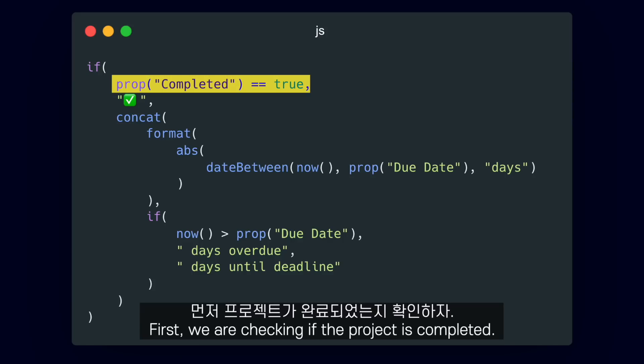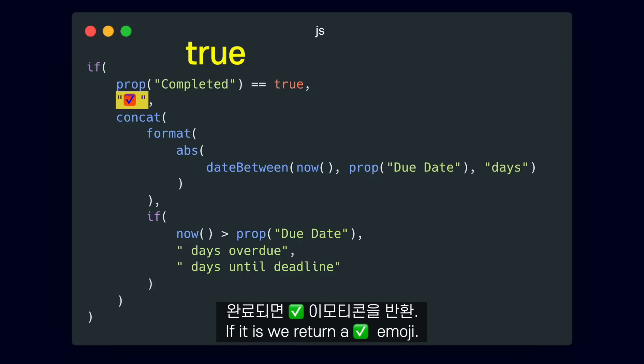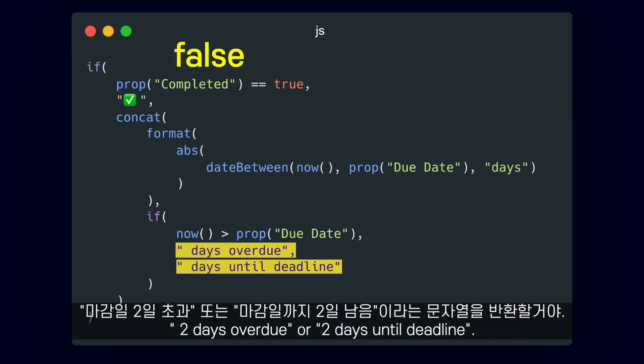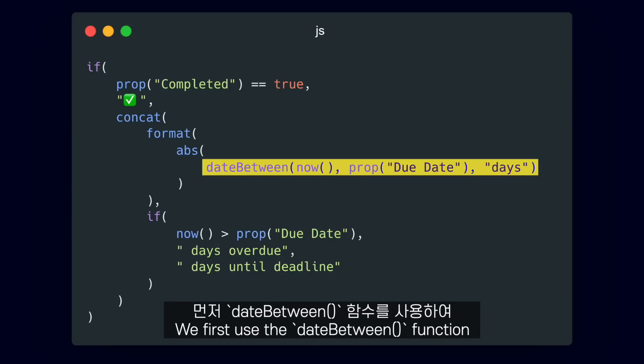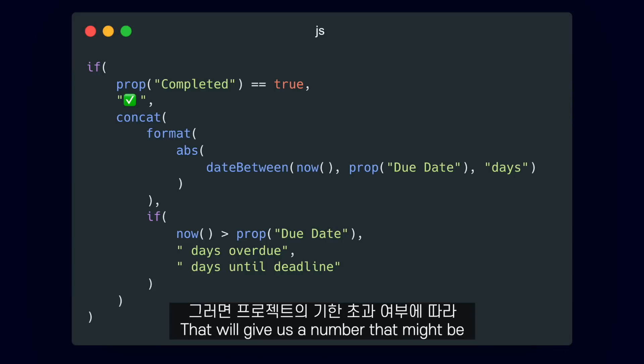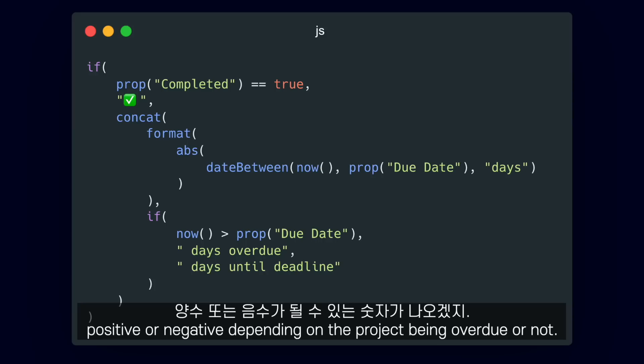First, we are checking if the project is completed. If it is, we return a check emoji. If it isn't, we are going to return a string that says, for example, 'two days overdue' or 'two days until deadline'. We first use the dateBetween function to calculate the difference in days between now and the due date of the project. That will give us a number that might be positive or negative depending on the project being overdue or not.